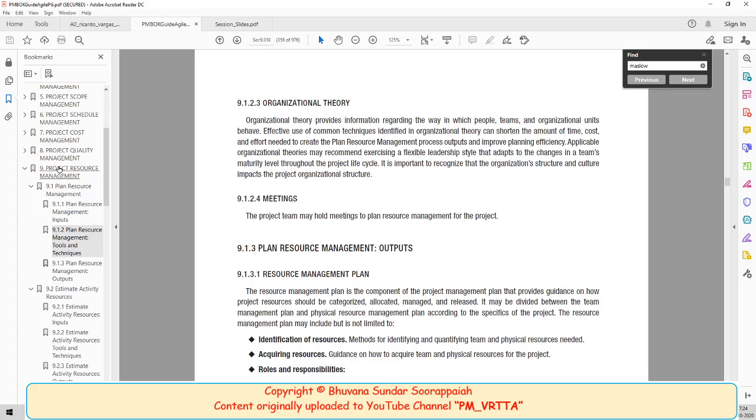In other estimations, you use ballpark estimation or rough order of magnitude estimation. That's the first level. I will tell you, when you are beginning to build a house, you are a contractor, and somebody comes and asks, I want you to build a house, how much will it cost? Some basic questions you ask, how big is it, a 3 BHK, in which area you want, but you don't ask too many detailed questions.